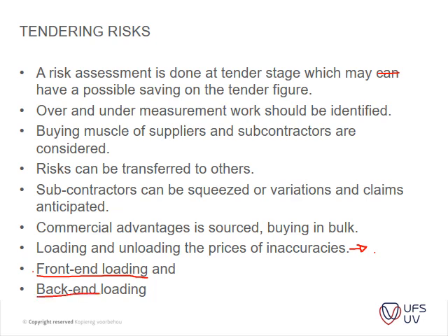And then obviously you get your back end loading, where you load some of your items at the back of your project. That might be, for instance, your finishes, etc. If you anticipate that that will actually assist you. If you can perhaps get certain items at a better cost, it might benefit you to actually load some of your items at the end of your project, or when you foresee that your cash flow might be low at the end of the project, you can actually load some of the items there.